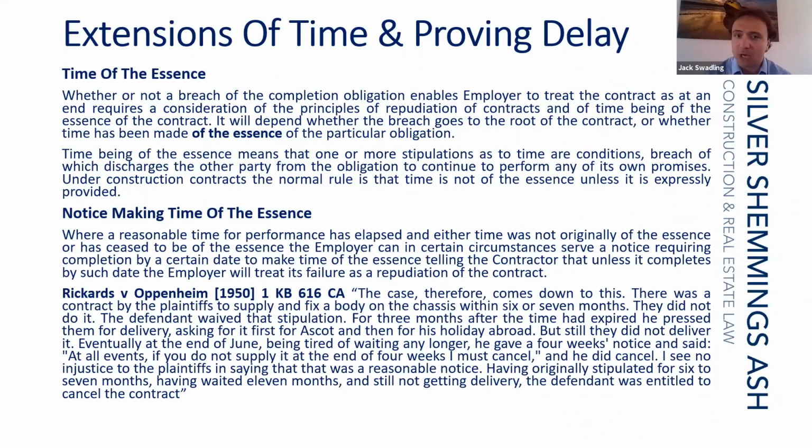So that would mean that non-completion was a repudiation of the contract that the employer was entitled to accept. Now, the standard rule is that the date for completion is not a condition of the contract. I think you would need some pretty clear and explicit wording if that's really what you were trying to achieve.